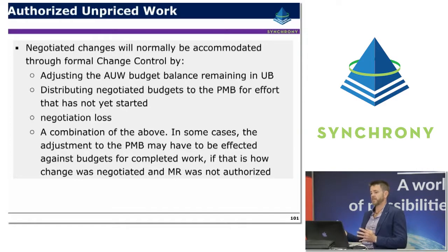In some cases, the adjustment to the performance measurement baseline may have to be effected against budgets for completed work. That's the worst case scenario, if that's how the change was negotiated and the MR was not authorised.